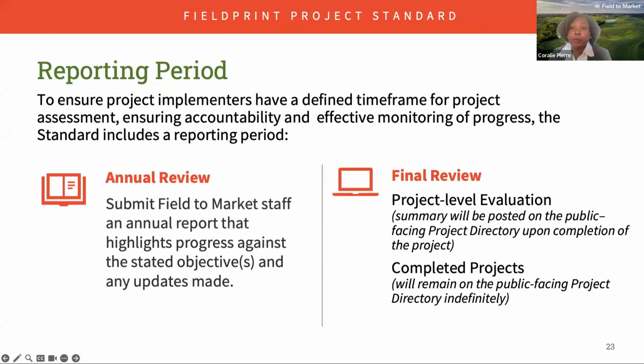Now, moving on to the reporting requirement, the standard emphasizes the importance of submitting an annual report that highlights progress made against stated objectives and any adaptive management taken. Additionally, upon completion of the project, a project level evaluation should be conducted, and a summary of this evaluation will be made public on Field to Market Public Project Directory.